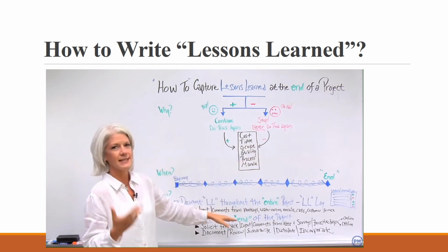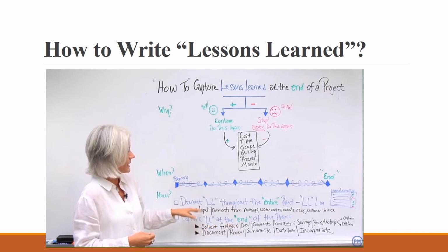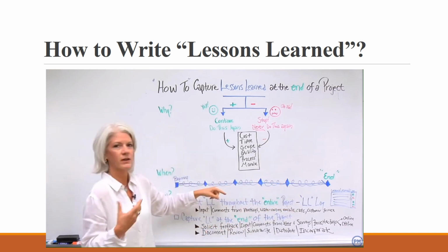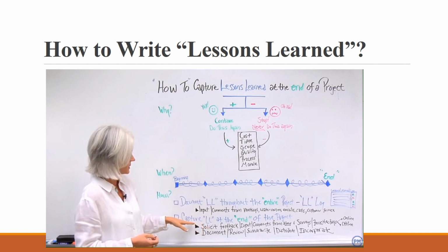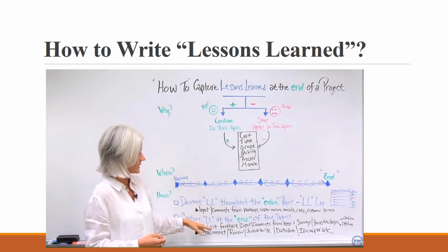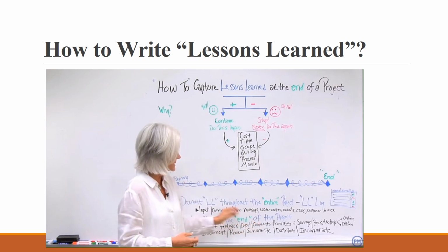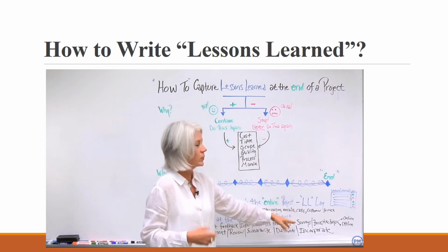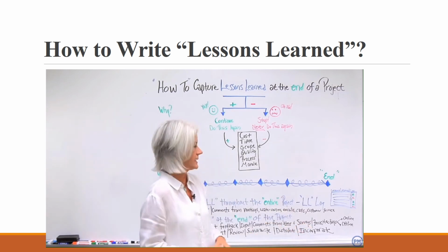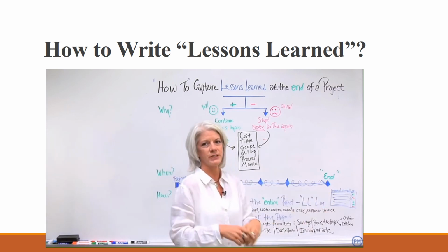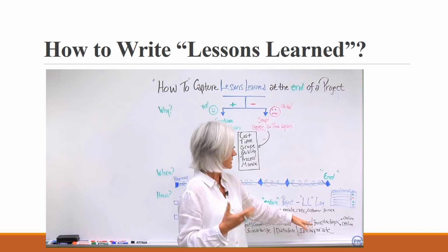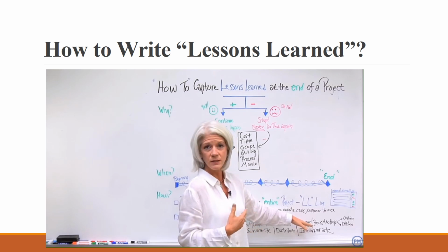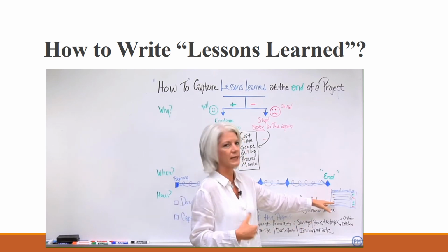And then at the end of the project, you want to capture the lessons learned. Okay, so we have our lessons learned log. And at the end of the project, it's one of the closeout things that we do. So how do we do this? We solicit feedback, input, comments, the same as we do here. And I think a great idea is capturing this information and distributing it out to the team. You can do it through surveys, and you can also solicit feedback on other lessons learned and have them go back and reassess.